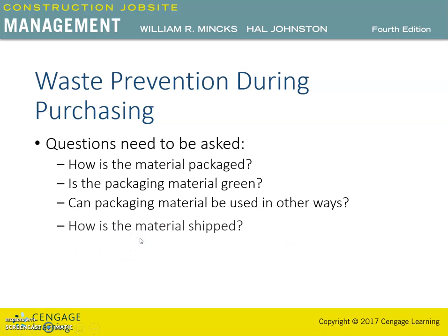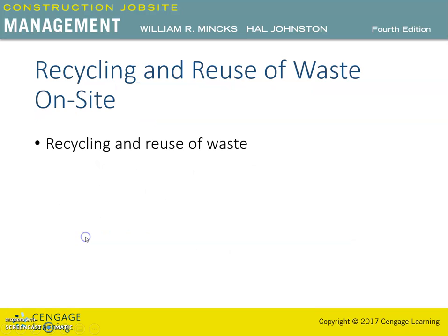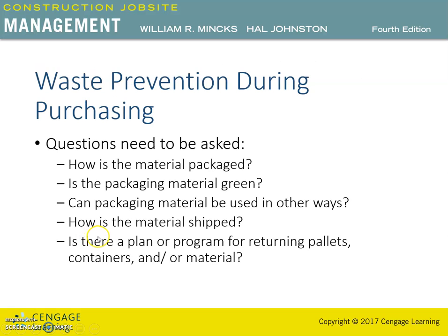And how is the material shipped? Is there a plan or a buyback program for returning pallets and containers and or excess materials? Most contractors and specialty contractors have never asked these questions of their suppliers or of each other. Asking them would help both reduce the waste stream and create a greener completed building.